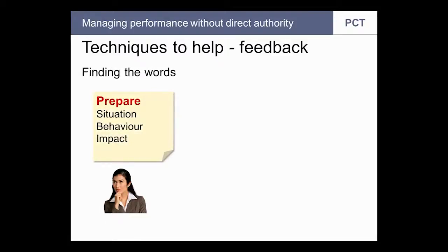Think through how you will introduce it. Note the situation in which something happened or didn't happen. Then the behaviour. Note what the person did do or didn't do. And finally, something that legitimizes your approach, the impact on the project that had.